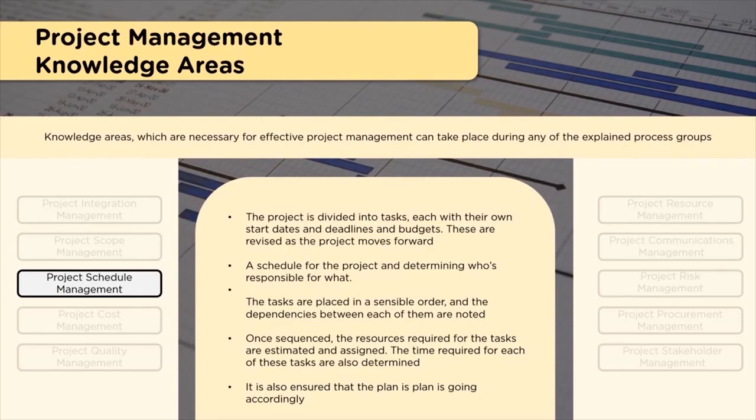When I say WBS element, it's quite obvious it comes from scope management. When I say allocation of resources, obviously it has to work with resource management to create resource calendars. If I say cost management, it is to understand the money flow, the cash flow. So a budget should be there for the project, and the cash flow, when what amount is required. To understand that, cost is linked to schedule. So all these knowledge areas should work very closely, coordinating and interfacing with each other.